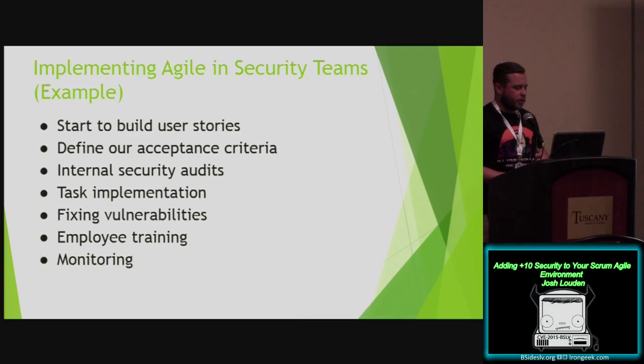From each story, we'll continue to break that down into acceptance criteria. And then from here, we'll define our tasks more clearly. If a task can't be defined in at least a single sprint, then we need to try and figure out how to break a specific task down further, because we want small slivers, and we want to start building, layering tasks on top into our large project.